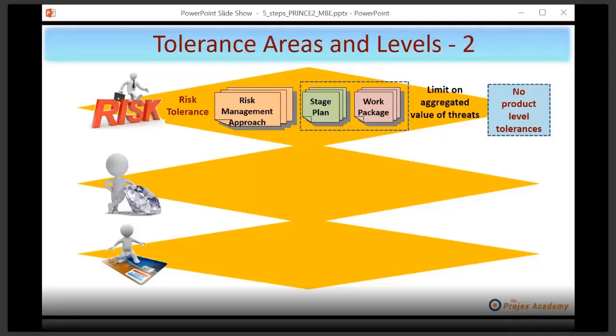But wait, I haven't finished. There's another way of dealing with this. You see, when you have a risk, you could merely call up particular specifically named risks like risk 5. And you could then say, by setting tolerance, something along the lines of, if that exceeds 20% likelihood, raise an exception report, because it's a very severe risk. Or conversely, if the impact would change by some significant amount. Can you see what I'm getting at here? So you could use aggregated, the impact, and the probability to come up with a risk amount.